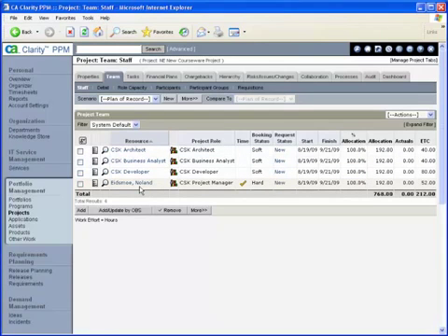Now when we put a named resource on a project, that named resource should be filling a role. In this case, I am filling the project manager role. We will eventually get to a point where we need to have the architect role replaced with a named resource, and when that occurs, that named resource should be picking up the architect project role. So the project role is something that we need to help with the placeholders for doing work on the project.